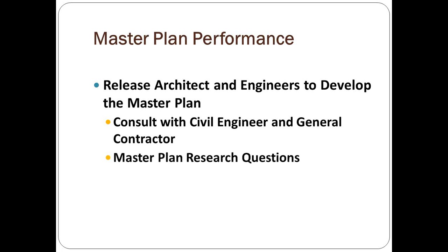You've got a lot of questions to answer. I've given you a master plan research set of questions that you want the architect and the engineers to have, and before they go and do a whole lot of work, they ought to go ask these questions, because if they just assume that something is this way on your property because it was that way across the street, they might be wrong. There might be soil tests that you want to take and other tests that you want to do to the soil along with the surveys,